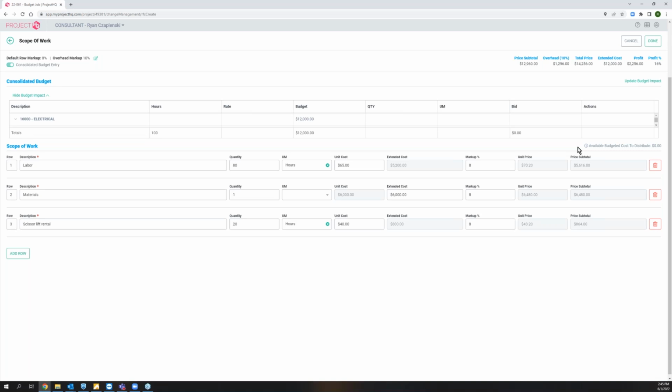So again, pretty much the same example, and I'm sure your change orders are going to be broken down more. For the sake of time and to make this as engaging as possible, we're not going to sit here and go through every single scenario. But you could break down more than one cost code into that. Maybe my change is adding a whole other room onto this building or whatever. So it's more HVAC, more electrical, more carpentry, all that stuff gets affected. You can break down the total cost of the change into however many different cost codes and cost classes are needed.